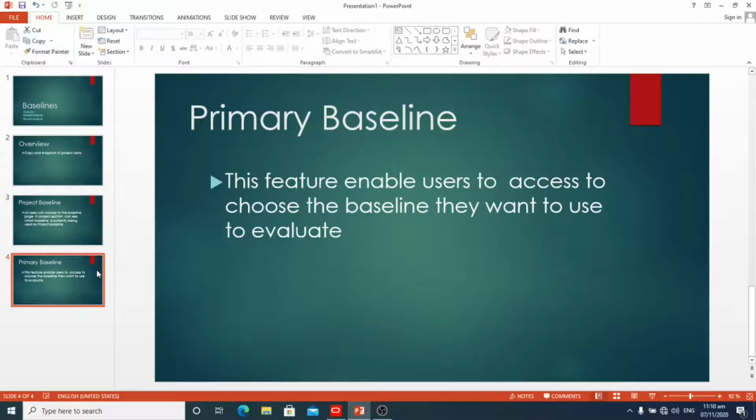On P6 Web Access pages that display live data, such as the activity page, you can choose to display primary baseline data as well as project baseline data. In addition, for the live data displays, you can specify a project level setting that determines whether earned value data is calculated based on the current primary baseline or current project baseline.